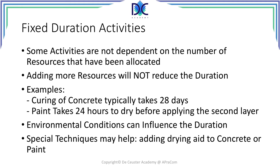The second type of activities are fixed duration activities. The duration of these activities does not depend on the number of resources that have been allocated to the activity — adding more resources will not reduce the duration. Some examples are the curing of concrete, which typically takes 28 days before concrete reaches its calculated strength.